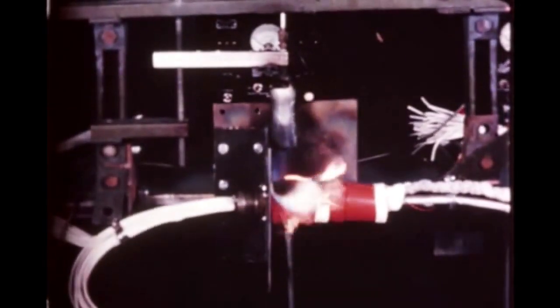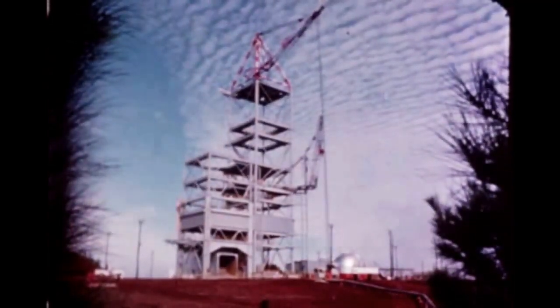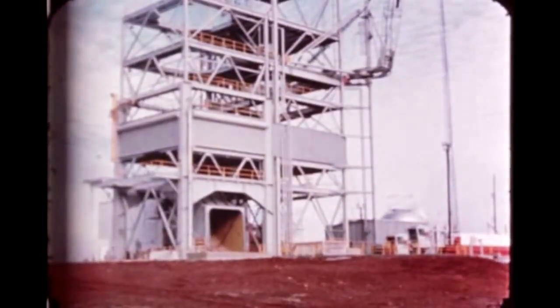During this quarter at Rocketdyne, flame resistance testing of the connector for the flexible armament harness used for all J2 electrical control and instrumentation wiring was conducted. In this test, the system withstood a time and temperature rate of 6½ minutes and 2,000 degrees Fahrenheit, which exceeds normal requirements. At MSFC, construction of the J2 engine test facility is virtually complete. Beneficial use of the facility is expected in January.